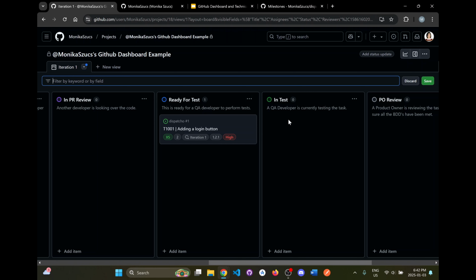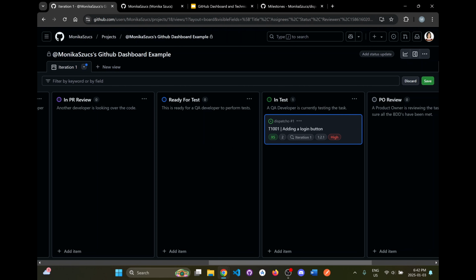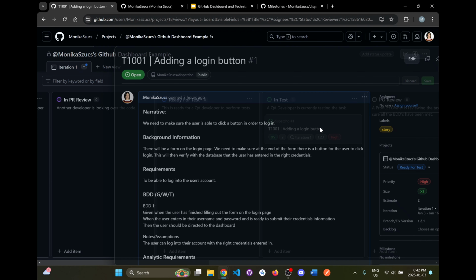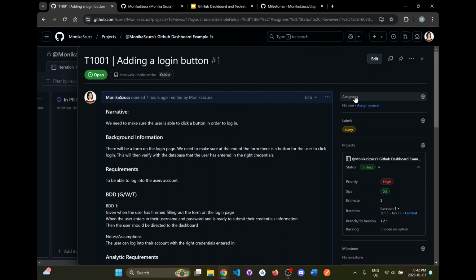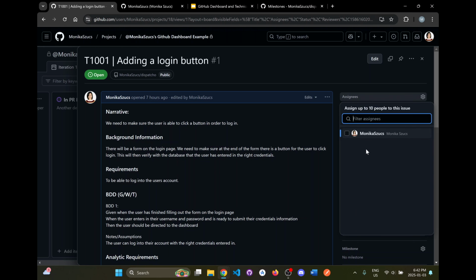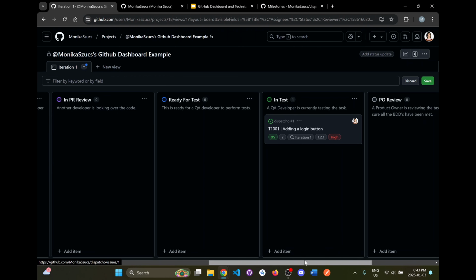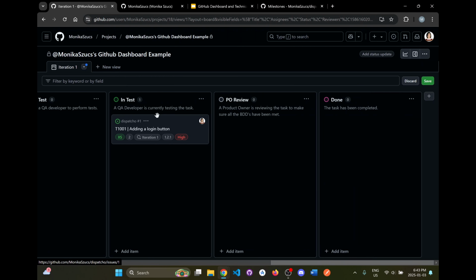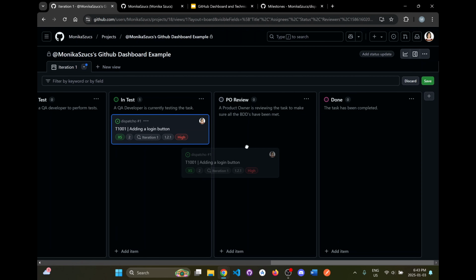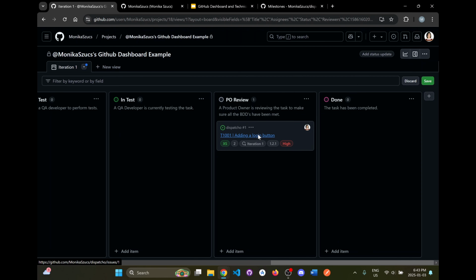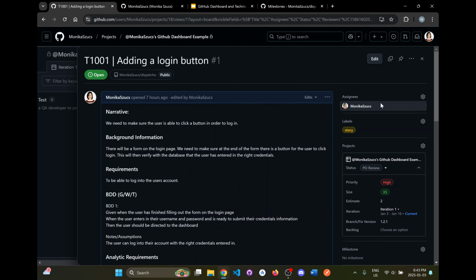So when a QA member is ready to come in and work on a task, they would grab it and drag it over. Now they're starting to test it. They would now assign it to themselves. So here you would have someone else on the QA side, right? Maybe it's Bob or Smith, whatever it is, pretend this is someone else, but their name will be assigned to this task now. They're working on the QA stuff, and when they're done, they will send it over into the PO review column, and they will unassign it from themselves.